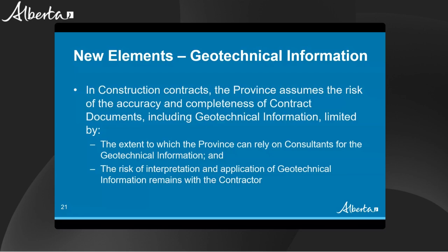Interpretation and application of the reporting will remain a risk of the contractor. Contractors are responsible for means and methods of construction, so they are the parties best able to manage and price the risk of how that information will be used to inform their means and methods.